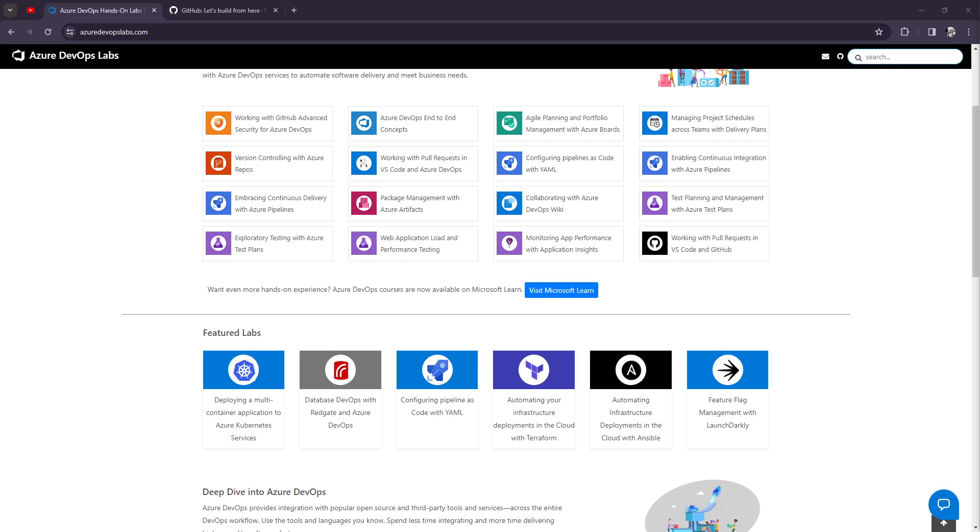Scrum in Azure DevOps: In Azure DevOps, work begins its life cycle in the portfolio backlog. There are two work types you can create there: epics and features. Features are always a child of an epic. Once work progresses onto a Kanban board or a task board, you need to split the features out into the main work type.